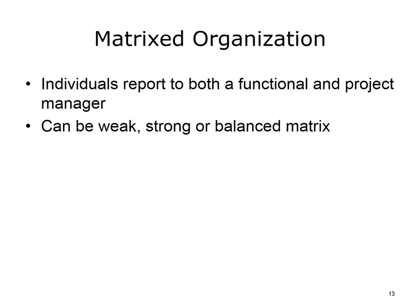In a matrixed organizational structure, the project resources — that is, the people working on the project — have a departmental or functional manager and also report to a project manager. The leadership or authority in the matrixed organization is shared between the project manager and the functional manager. There are three sorts of matrix structures: weak, strong, and balanced.